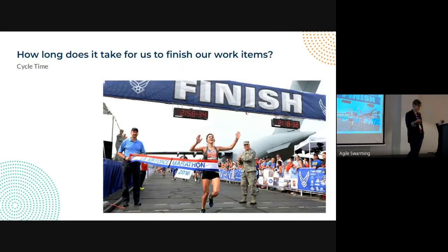So the first thing that I've noticed is really eye-opening for the team is when we actually start looking at the time: how long does it take for the team to complete an item? And I remember the team discovering that they have maybe not a majority, but a lot of items that needed around 60 days to complete. We are talking here about task level. It's a lot. And they discovered that in their quest for having as small tasks as possible, they had forgotten that each task has to be testable. So the items were waiting to be tested properly.